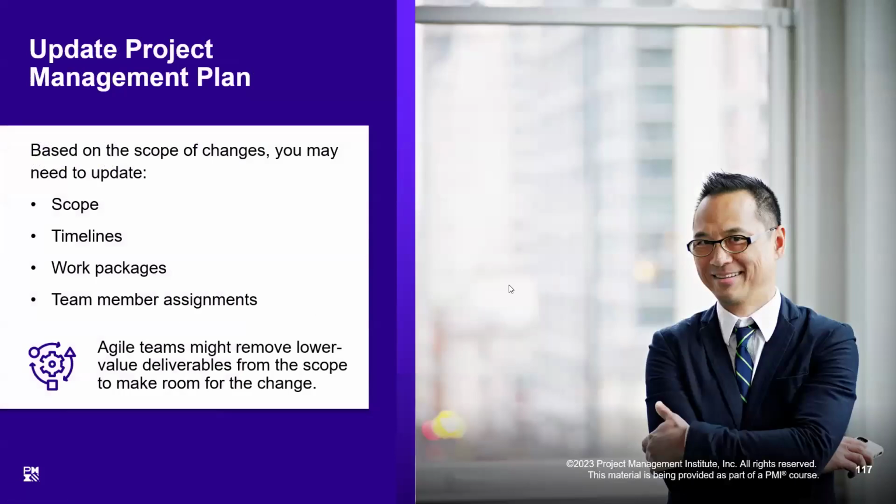Once you have done all that we have just discussed, wherever there is any change request approved, you are allowed to make the relevant changes to your baselines, to your management plans, to anything included in the project management plan. After you have made those changes, you should again get them baselined and approved. All three baselines must be approved by the boss. And then you can continue with the rest of the project.